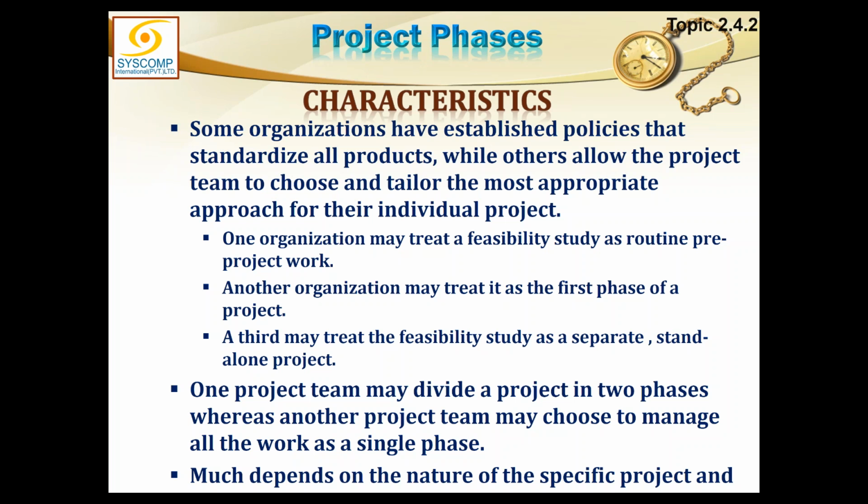Because the basic thing in a project schedule is that it should be in kind of overlaps and stairs. There should be a lot of overlaps in it. Activities must be overlapping, and it should be in stairs, right? So if I'm starting all the phases, it is not stairs. If I'm doing everything in sequence in my project, that is also not acceptable. There is no parallelism then. So we have to find some middle way, because the efficiency is lying somewhere in between.